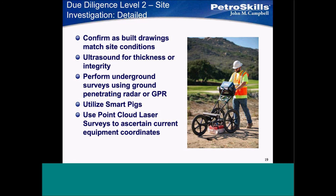Confirm that you have as-built drawings. For a lot of legacy sites — facilities that have been around a while — you don't always have as-built drawings, so that is absolutely critical.